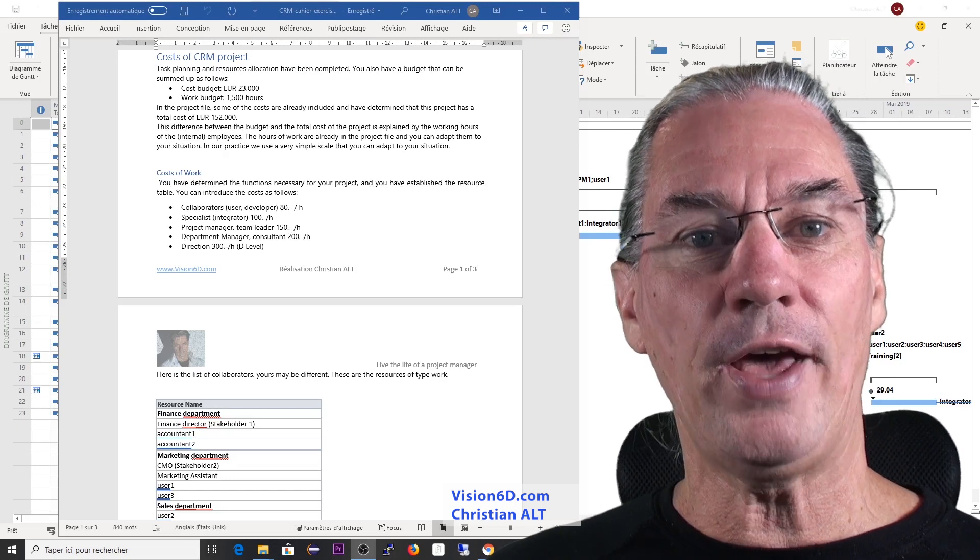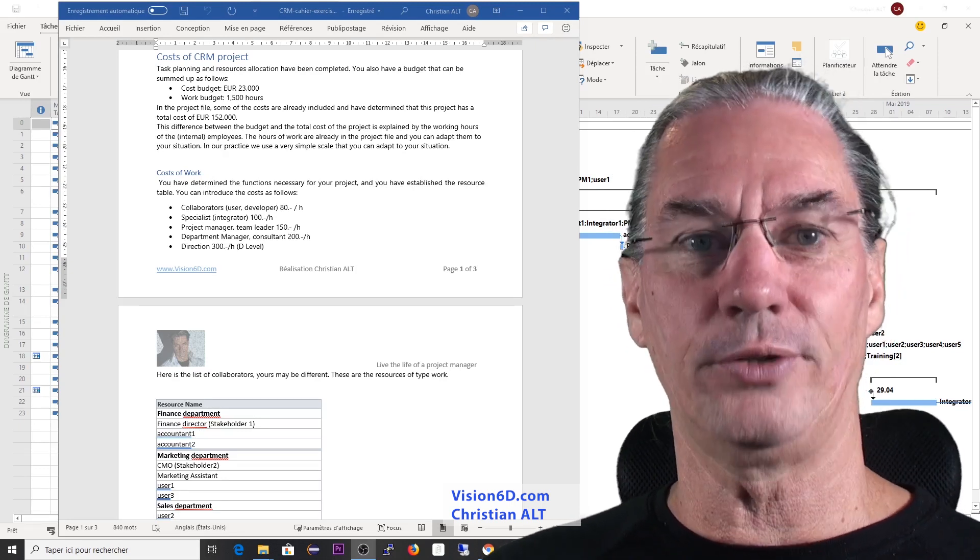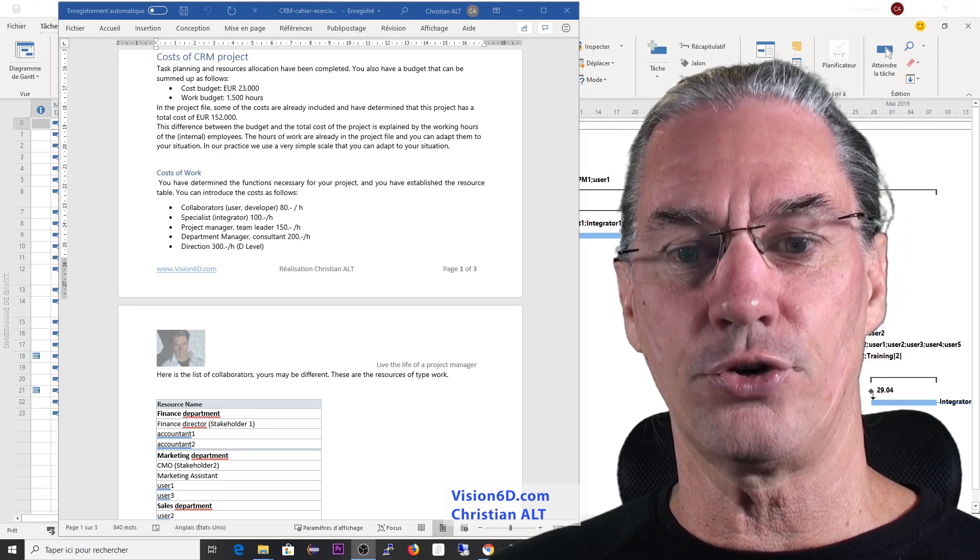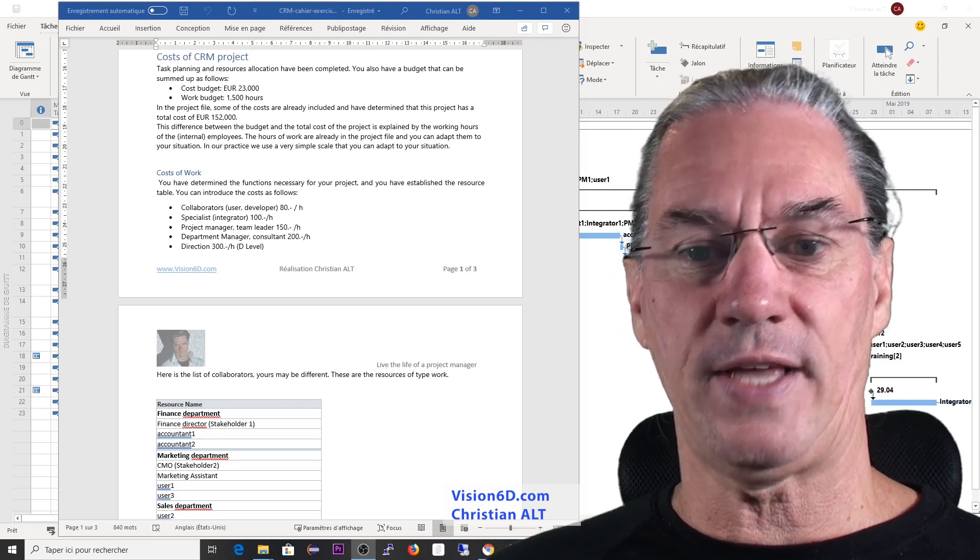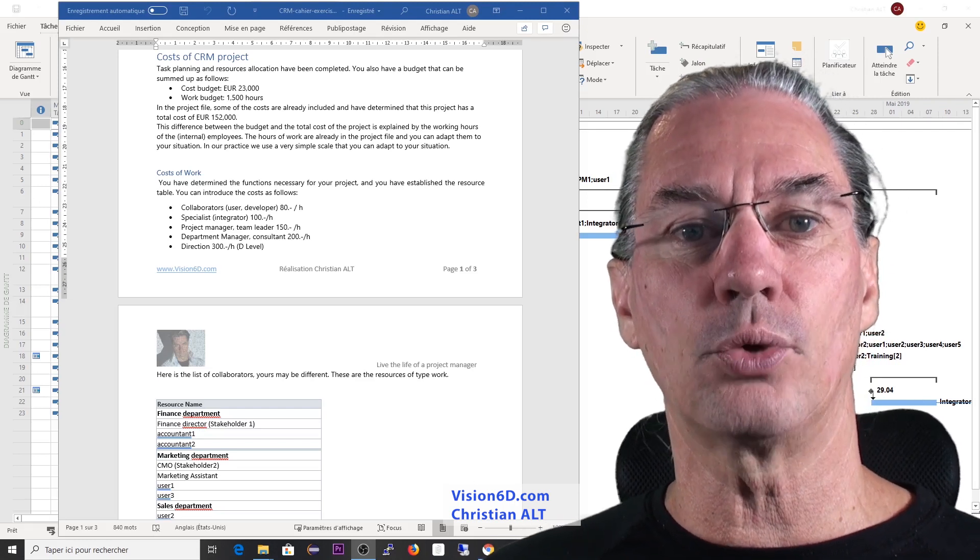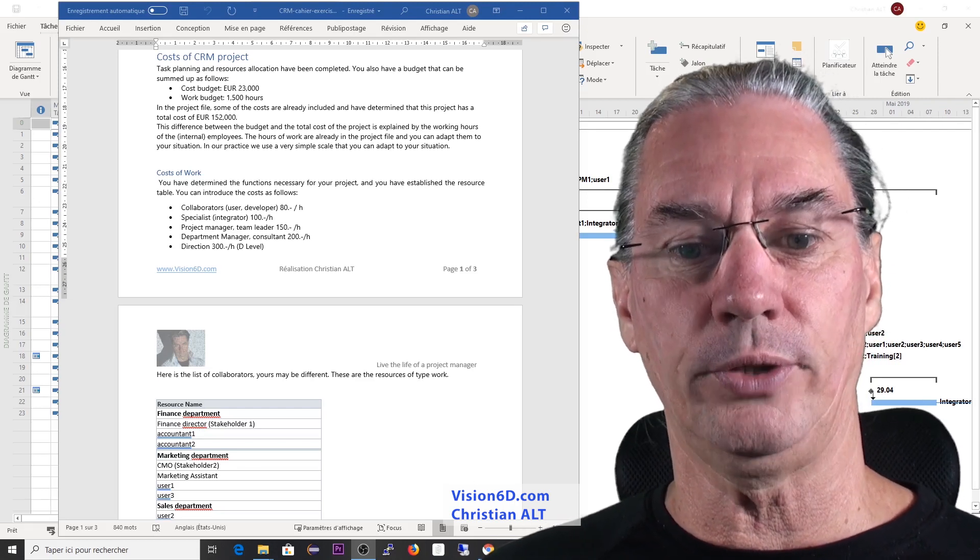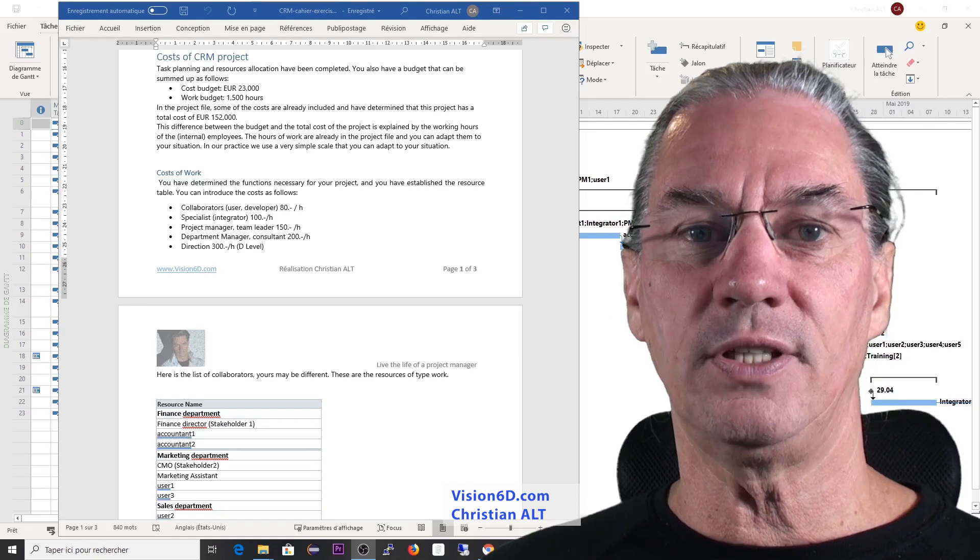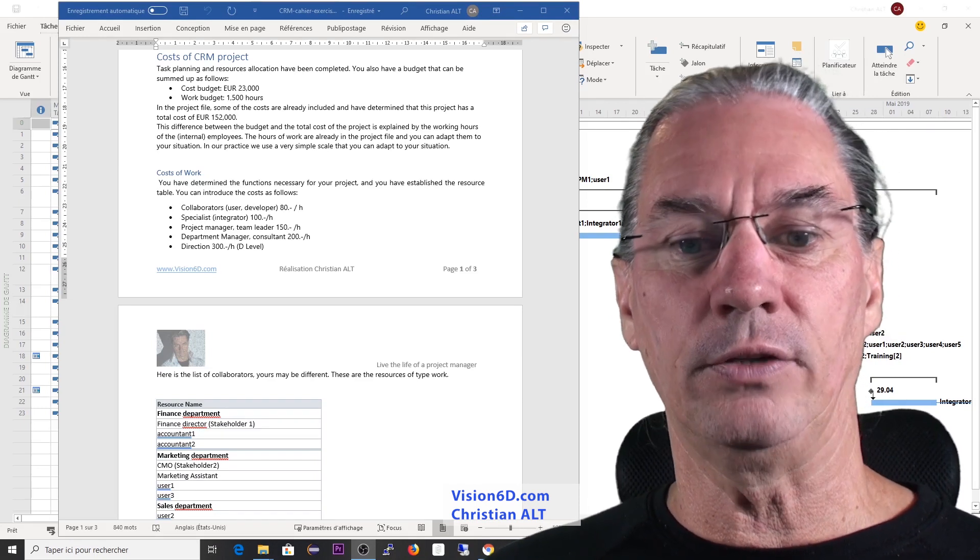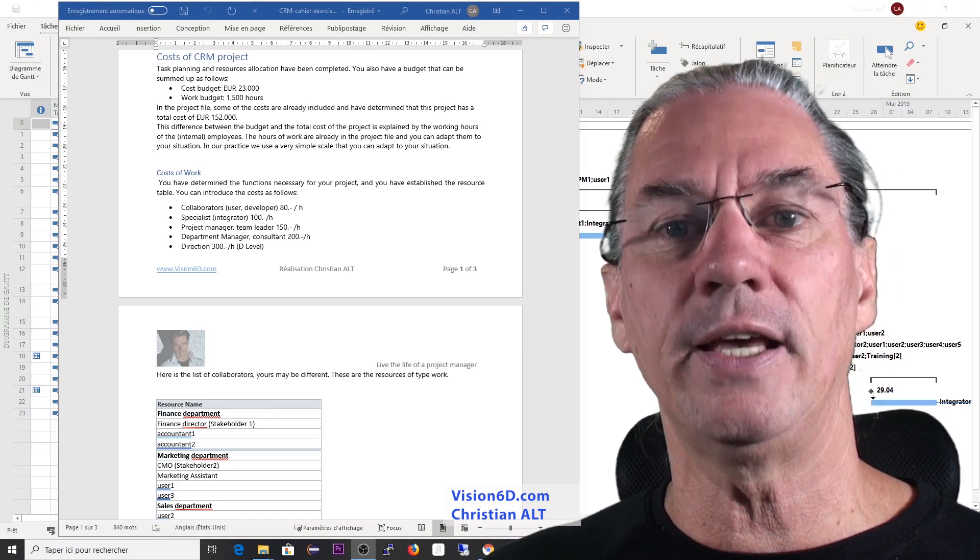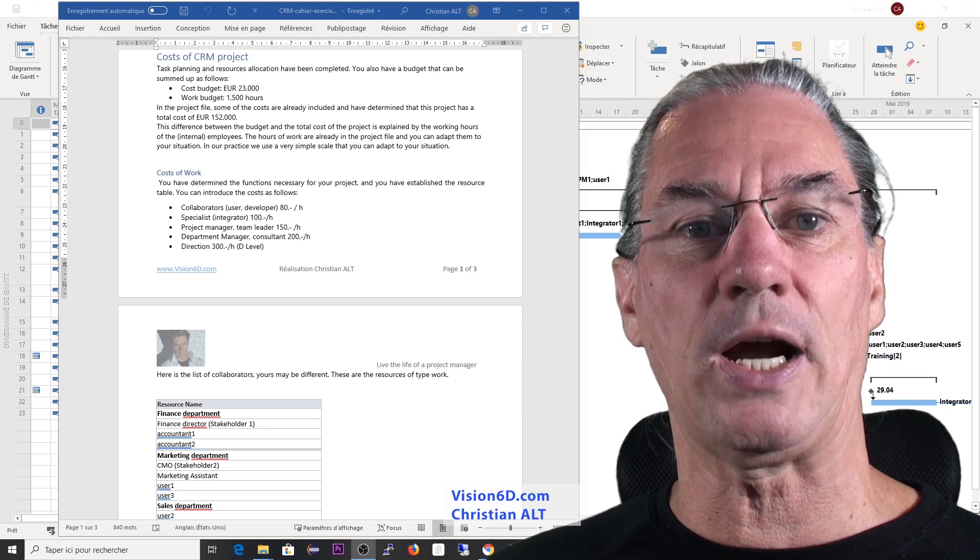Then you have project manager. You are the project manager and the team leader, for example. They will be 150 euros per hour. And of course, then you have the department managers that are involved and they cost about 200 euros per hour.